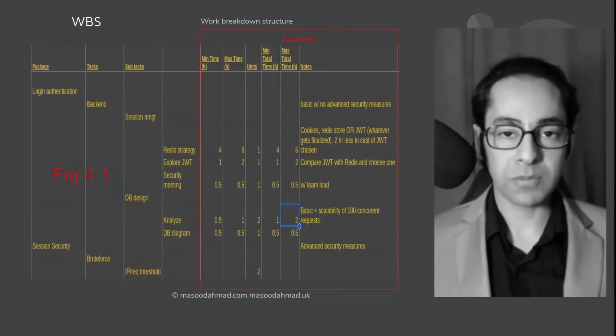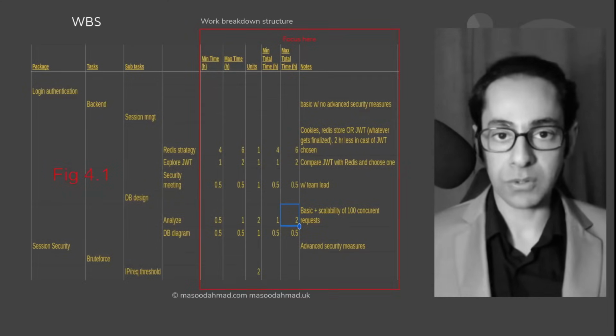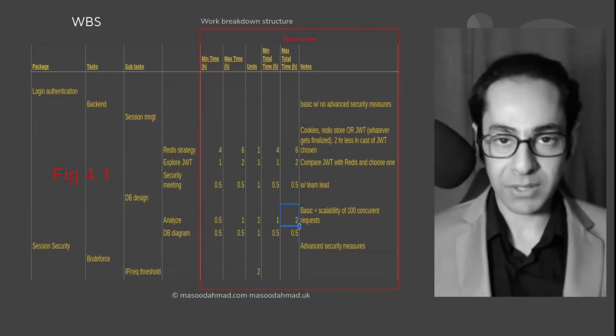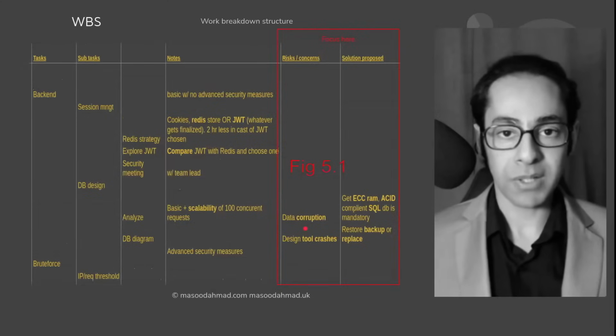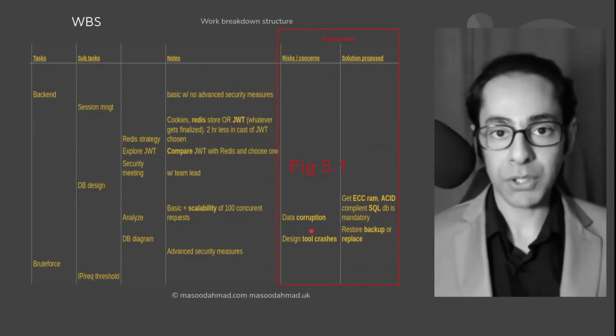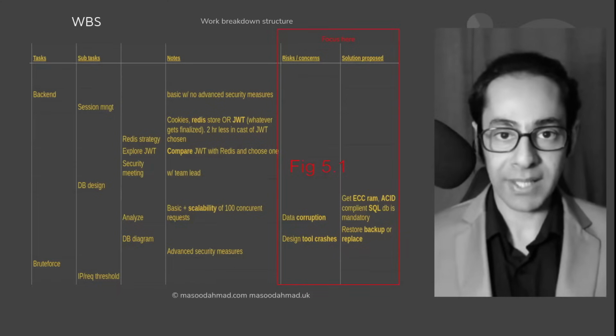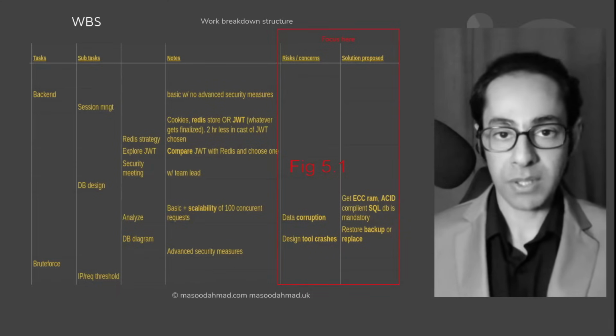I observed it was best to add 3 to 15 words of notes on each task if and when needed. Not more, not less. You need to be very precise. You can bold the words, underline them to emphasize, to make it quick for the reader to understand in a short span of time. Summarize information without missing anything. It's an interesting skill to summarize and highlight and format the information in such a way that you use 20%, let's say, of the text to show 100% of the information.